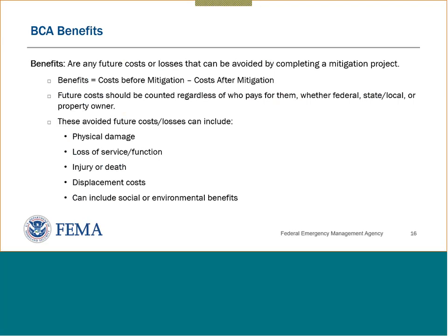Benefits. Basically, future costs or losses that can be avoided by completing your mitigation project. But really what we're looking at is the difference between what the costs have been to your community, or what they are projected to be in your community if you didn't have your mitigation activity in place, versus what those costs would be after you've got them in place. And so we're looking for that difference, and we call that the benefits.